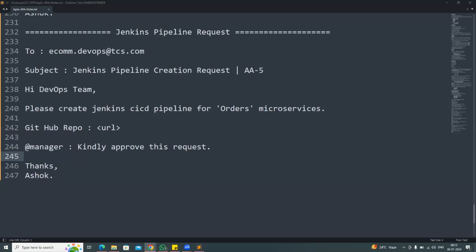So for every Scrum call, you're responsible for answering on a 3-point story, right? Correct. For example, if you're taking an 8-point story, you give the progress like, yes, I'm working on it, and I'll be completing it by tomorrow or the day after. You can tell that. If you are working on an 8-point story, which is 3 days of time, you will tell the Scrum Master that you are working on a story which will take 3 days to complete.